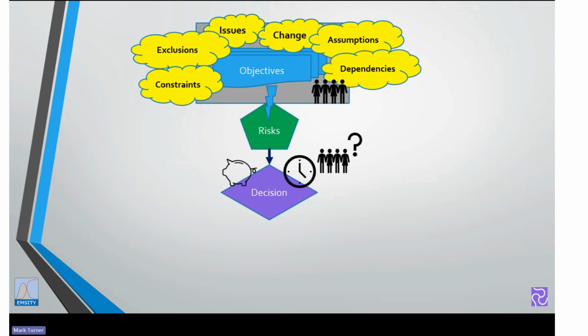So we come to that decision point, and this is where we would use a tool like Safran Risk Manager to help us prioritize, because we've only got so much money and we've only got so many resources. So we would make a decision: does the risk fall within our appetite or outside of our appetite to live with it? In which case, if it's within appetite, we would accept it. We would still have it on our risk registers.